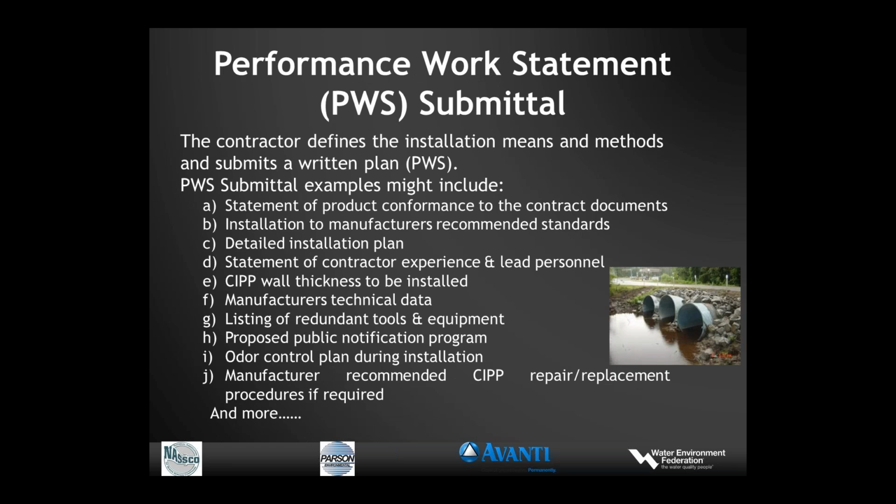Next is the performance work statement. This is a very important part of the contractor's submittals in a performance specification. This will be abbreviated as the PWS quite often and following throughout this presentation. But up front is a statement of product conformance to the contract documents.